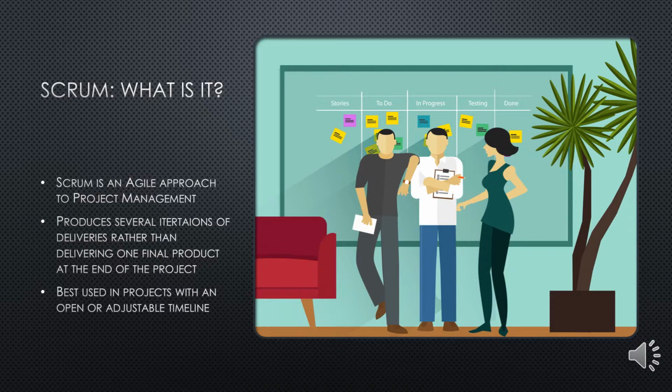Scrum best fits projects where there are less rigid completion dates, experienced team members, smaller risks, unclear requirements, and more flexible scheduling is required.